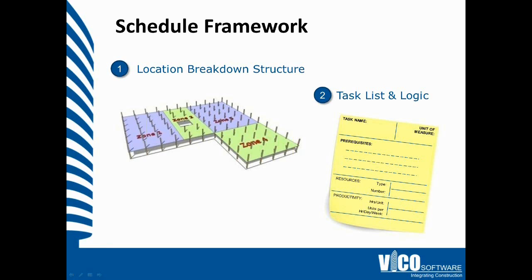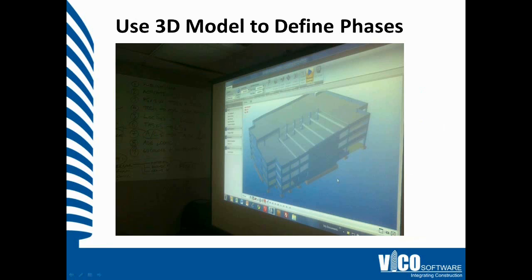Level of detail, of course, refers back to the comment I made earlier about using the model to help identify any pieces of the building that may not have been explicitly accounted for in the CPM schedule. We revisit those as well and see if it makes sense to include those as activities in your schedule.